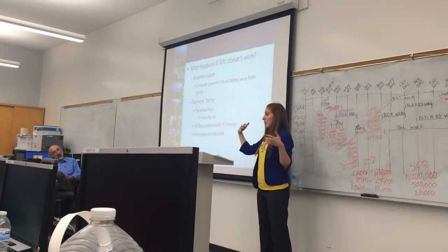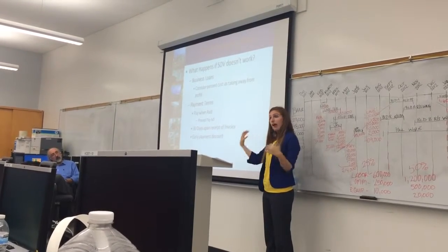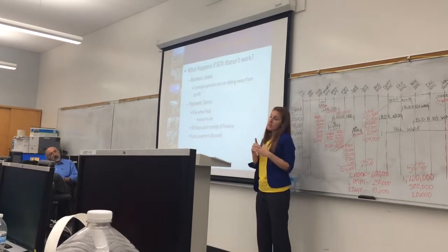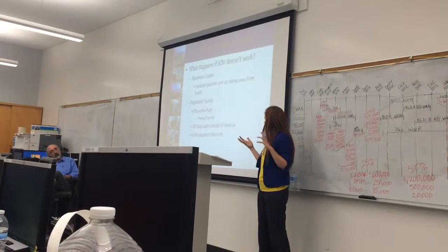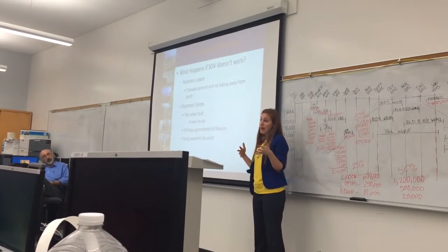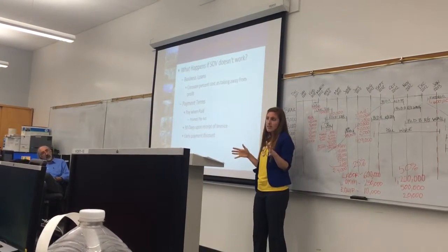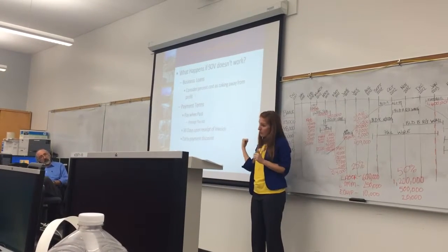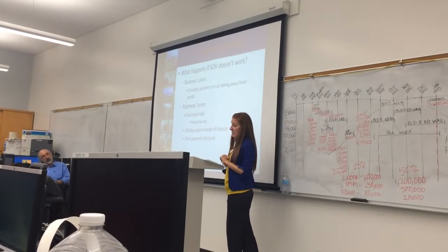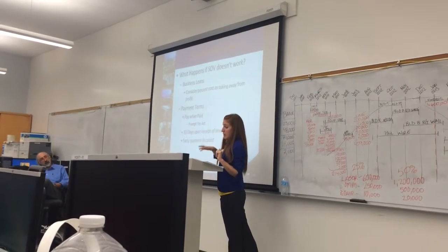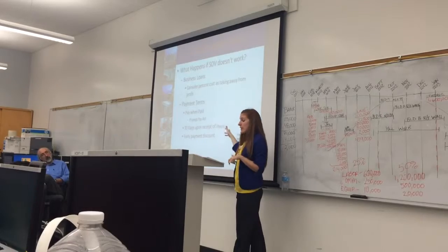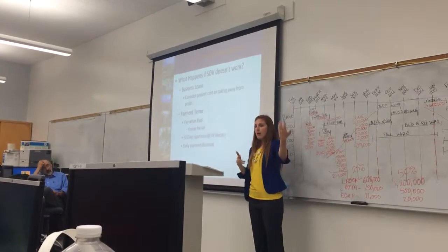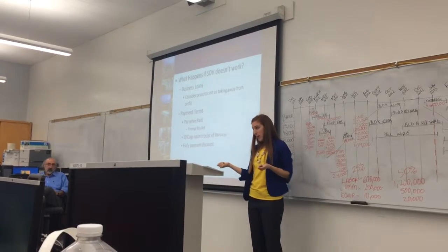When that relationship gets burnt down, and when you have a problem, is when that's going to bite you in the rear end. Because in California, you have to pay within 7 or 10 days. And so that paid when paid goes out the window if you're fighting. And that gets ugly. There's also 30 days upon receipt of invoice. That's just like your bills at home. When you receive the invoice, you have 30 days to pay it.